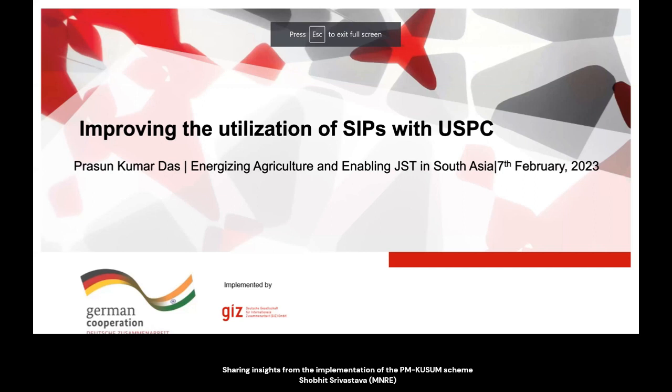So they have to estimate the project capacity by working out the agriculture consumption in the last, say, 2 to 3 years, and based on that consumption and the CUF estimated to be available at that location, they can work out the solar capacity that can feed those units.